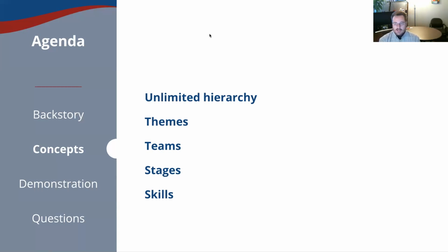You can actually go through and assign particular issue types and create a 7-level hierarchy. For example, you might have a corporate initiative that leads to epics and stories and then tasks, or you might have major epics. You might have a number of mechanisms that you use to organize your work in your organization. These are now adjustable. It is my belief that this unlimited hierarchy is going to make its way back into JIRA, just like some of the other ideas you see here on the screen.